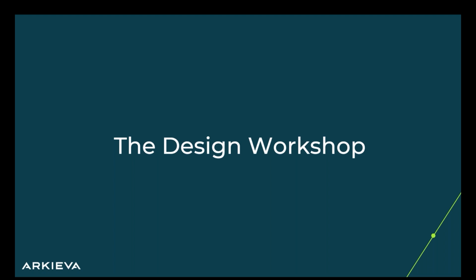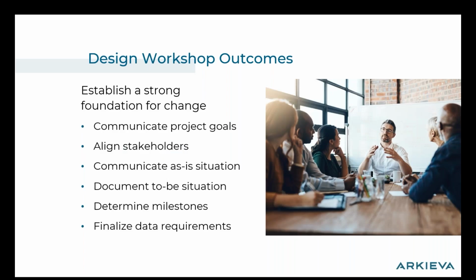And as I said, the supply chain planning solution is very data intensive. So the data workshop is a very, very important step, and it must be done after writing the SOW, but separate from the design workshop. But right after the data workshop, maybe within a week, maybe within 2 weeks, we should have the design workshop. The idea is to establish a strong foundation for change.